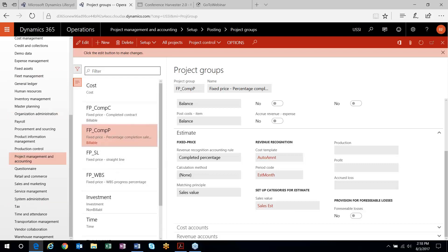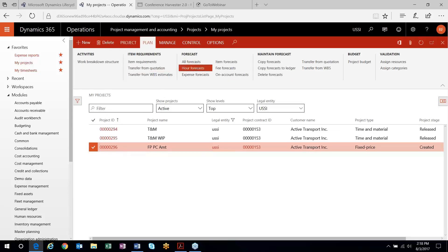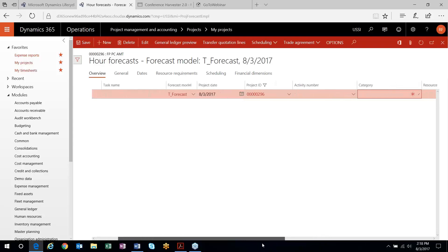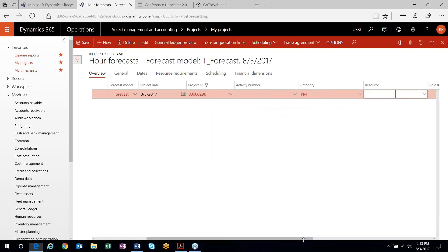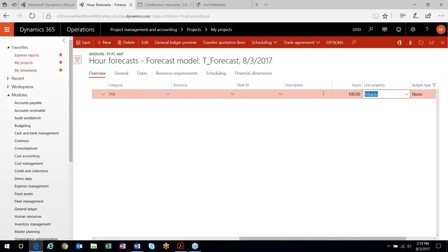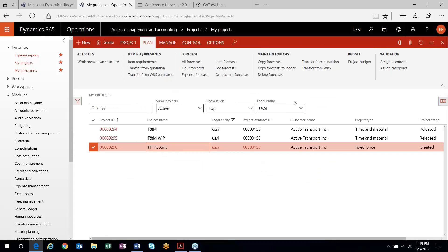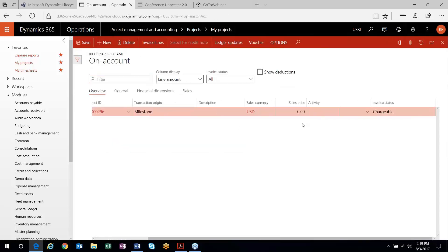Project groups control all the postings and how revenue is going to be recognized. On my fixed price project, I'm first going to put a forecast out there. When doing percent complete, it will calculate percent complete based on actuals versus budget. One way to enter your budget is through an hours forecast — I'll put a number of hours out here. I've got 35,000. The second thing you'll need is the contract value of your project.